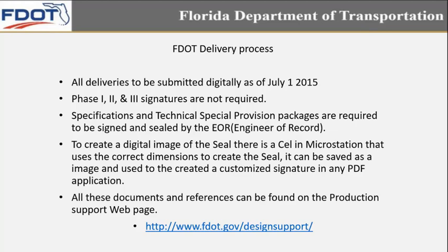For phases 1, 2, and 3, signatures are not required. Specifications and technical special provision packages are required to be signed and sealed by the EOR. To create a digital image of the seal, there is a cell in MicroStation that uses the correct dimensions. All these documents and references can be found on the production support webpage, and we have the link down there. As you can see, we're moving from quality to completeness.